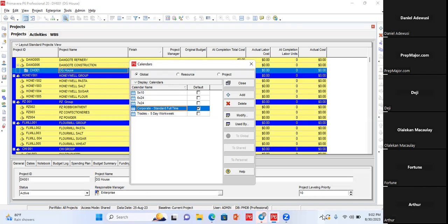So what you've done is, in the first week, you can only do how many days? You can only do 2 days work because Omolola only works 2 days, right? The following week, you will do 2 days. So you have extra 6 days to do.